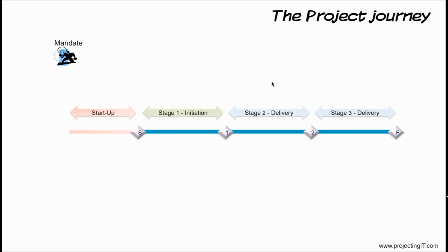The team manager uses the managing product delivery process, and all other processes are used by the project manager. Each process defines what work needs to be done, what outputs will be created, which templates can be used to create those outputs, who will review those outputs, and who will approve those outputs.